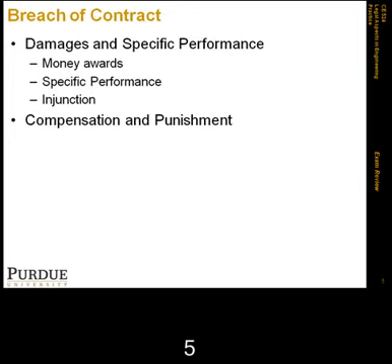Therefore, the damages awarded are usually for compensation for an actual loss, and they're usually not what we call punitive damages. Punitive damages are usually awarded in cases of tortious breach, where the breach is also linked with tort, which is a breach of other liabilities, such as extreme negligence on the part of one of the parties. But again, punitive damages have been rarely awarded in construction.